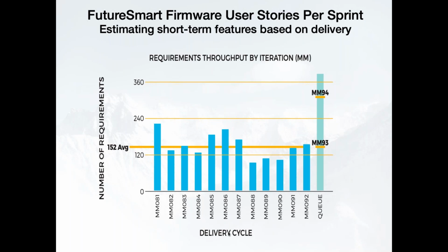If you're on the business side and you want to know what was getting done, you could quickly look at here and you could say if your requirements are here in the queue, it's probably going to happen in the next monthly release. If you're around here on the line, it may or may not happen depending on how throughput goes and productivity goes.